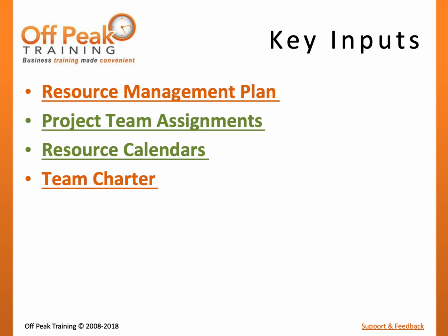The PMBOK guide defines a few inputs to the Develop Team process. The key input is the Resource Management Plan. This document includes training needs and techniques for rewarding and recognizing positive team performance. Project Team Assignments includes a list of project team personnel that will be the subject of team development.